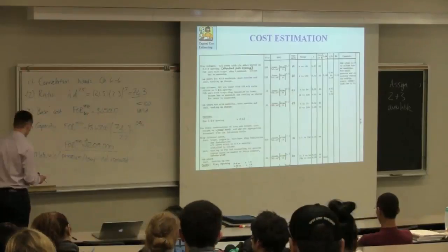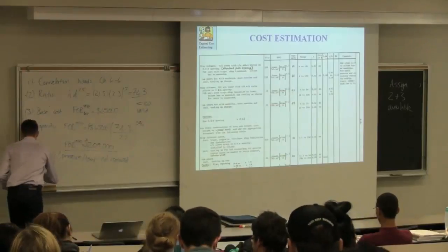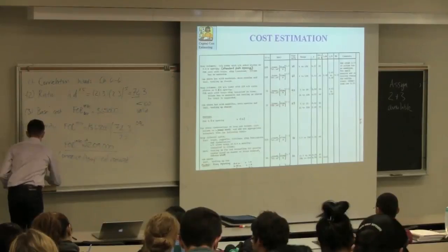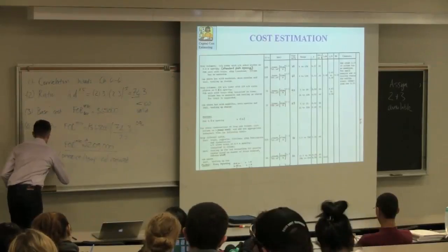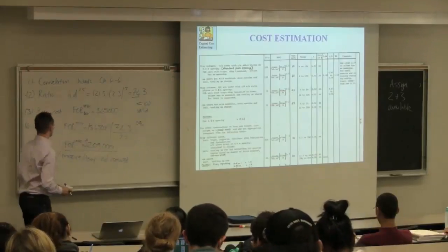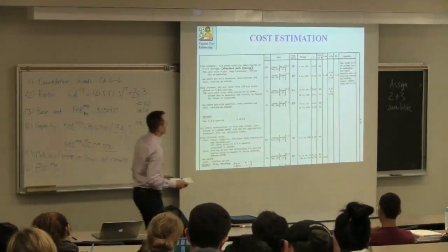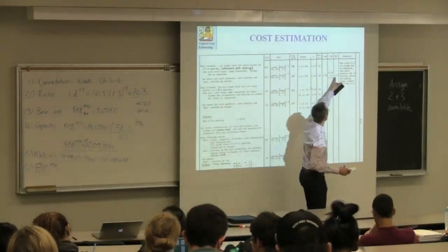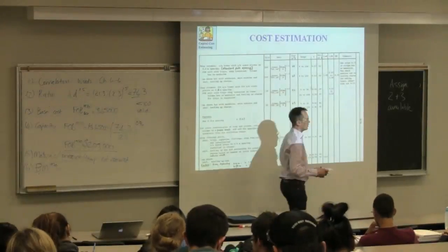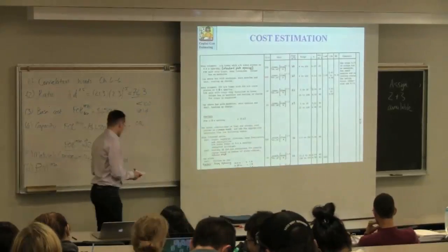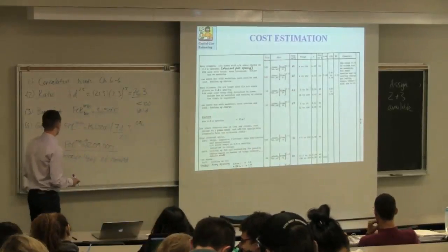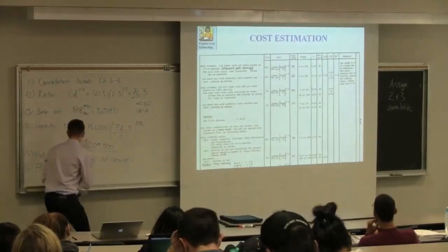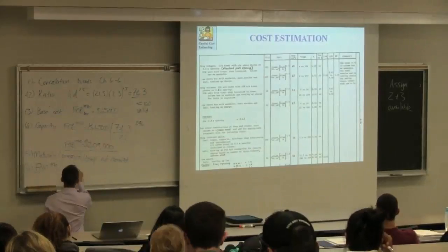Step 6 then is to get the bare module price. So the bare module price in 1970 is equal to this base price multiplied by 4.16. So this multiplier is for all these units. So that's a significant number in terms of relative to the other units we've been looking at.